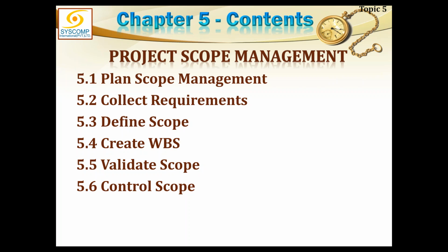Anyways, because this is the last process of planning, and when scope, time or cost have been planned, they are in the last process, they are to be baselined. This is scope, therefore we need to baseline it. So once we baseline the scope, the baseline of the scope will include three items, and these three items are the outputs of the previous process and this process. In the previous process we got the scope statement, and here we got the WBS and WBS dictionary. These three items put together are called the scope baseline.